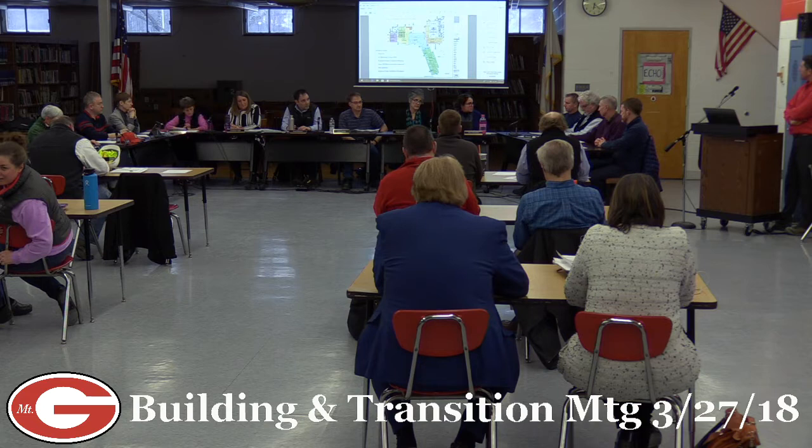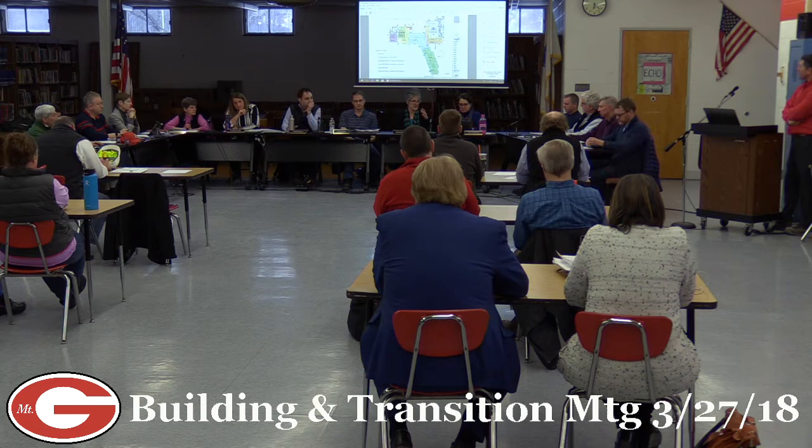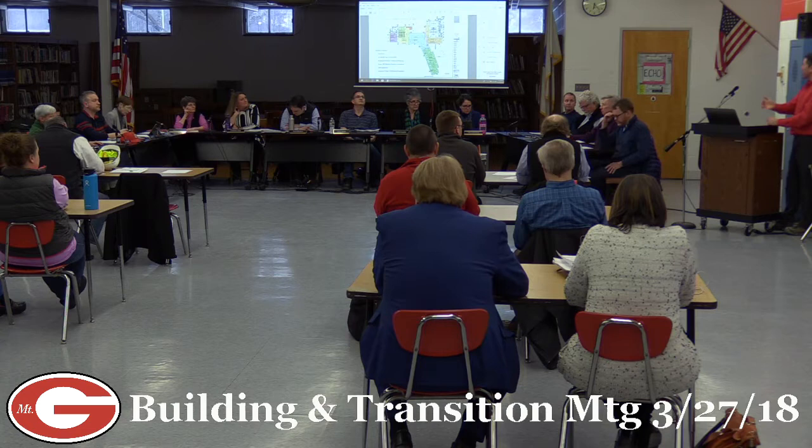Question. I want to ask about the demolition in the back there. You've talked about how other things are dependent upon that demolition. Can you give us a sense of that? Is that dependent upon other things being done first here? Are you going to start that simultaneous to working on some of this other work? Yeah, so the driver for demolition is getting the kids out of the building, and getting whatever needs to move out of the old building or into the new building. We've already had some coordination meetings with the district.